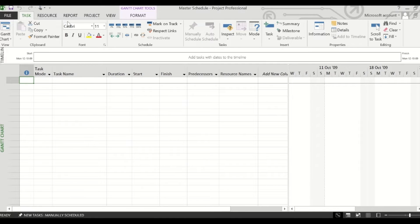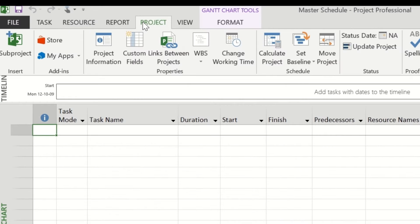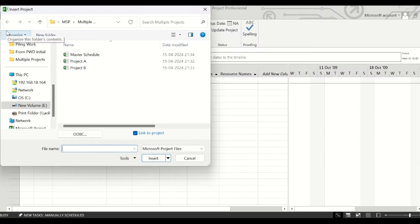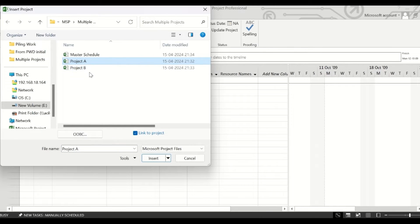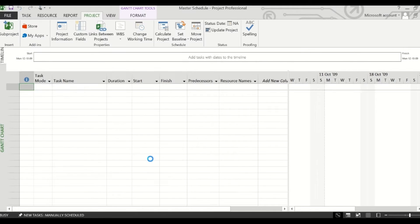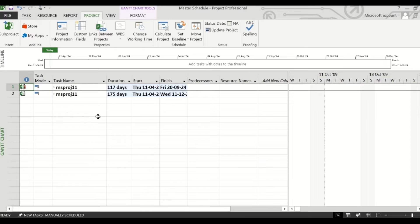After opening this, go to the Project tab from the ribbon and click on the sub-project feature. Here you will see the schedules you have created after going to the appropriate folder. You can press the Control button from your keyboard and select both the files and click on Insert. You will see that both these projects have been inserted in the master schedule.